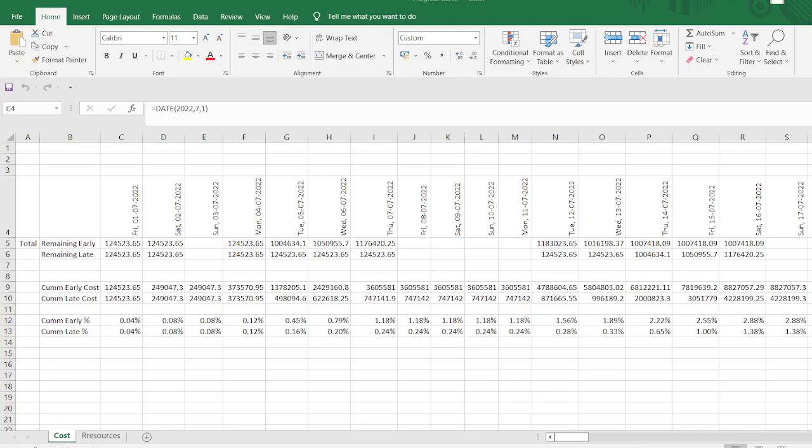So suppose that our meeting is held on every Thursday and we are supposed to make the update every Wednesday. So in this case we are getting the progress schedule percentage complete end of Wednesday. Whereas our progress curve which we generate from Primavera shows you the values at the end of Saturday. If our week starts from Monday to Saturday. So our values or the planned percentage will be at the end of Saturday. And whereas we are updating actually end of Wednesday. So in this case these two values will be differed from each other and which may sometimes the client or consultant may raise the issue why these two values are not coinciding.